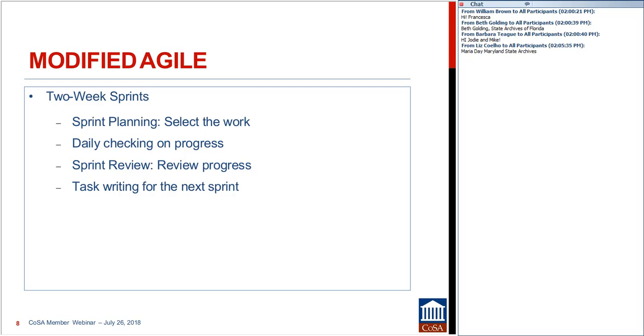These are the important tasks that have to happen next for us to move forward on our milestones and our deliverables. Each member of the team publicly claims the work that is theirs, that they are going to undertake in the next 2 weeks, with the assumption being and the hope being that when we get to the same spot 2 weeks later, all of those tasks will be completed. Doesn't always happen that way, but we try for that.